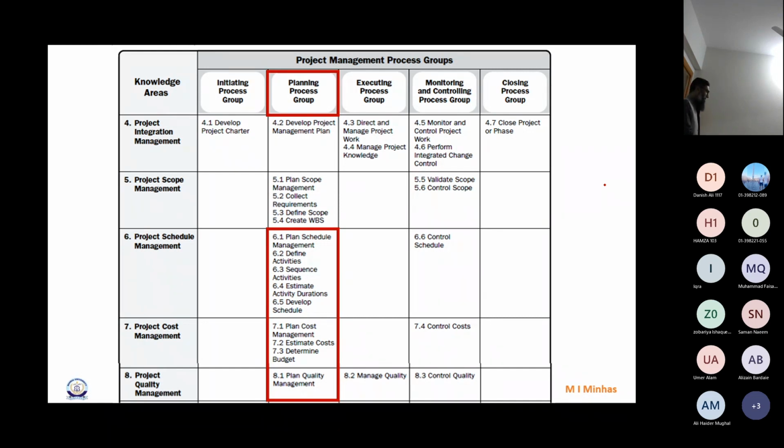And accept it now. So we'll get out that requirement traceability matrix. Do you remember that? We'll do that test. That test would come from this point maybe, or maybe from here. Correct? And then if passed, the customer will give the acceptance of that. Right? So validate scope is for the product and it is derived from the scope statement, and control scope is for the project and the baseline. Baseline, exactly. Very right, sir.